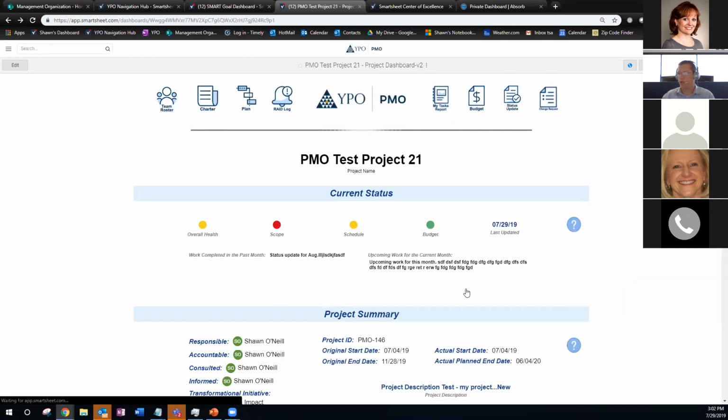So once the project's launched, the success criteria has been locked, so that it doesn't change. The whole point is that that's the measurement of success of the project, the measurement of everything getting completed, and that shouldn't change, especially not the day it's due. So there's a change request for it though. If it does need to be updated, then that change request will be evaluated by the accountable and perhaps get updated for you if that was a request that really needed to take place.